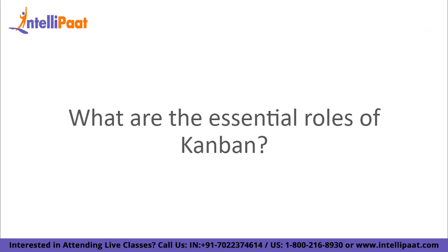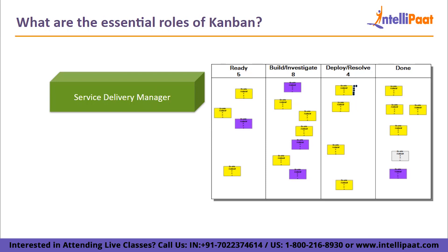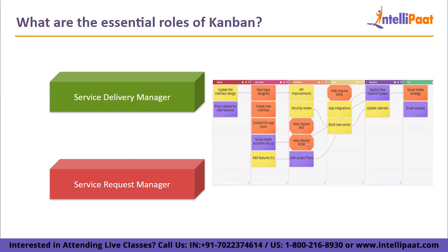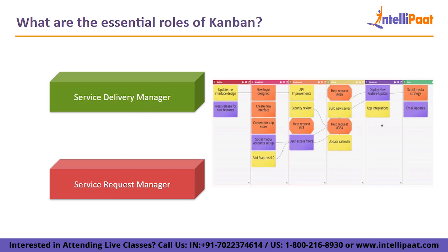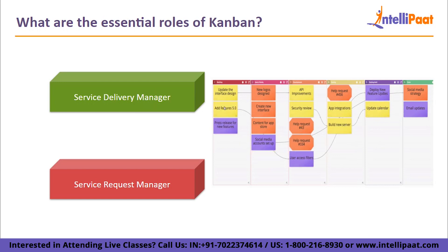Let us take a look at the essential roles of Kanban. First, the Service Delivery Manager. The SDM is in charge of increasing workflow effectiveness. Although there are some resemblances, this function is neither the same nor directly comparable to a Scrum Master. Then we have the Service Request Manager. The client's demands and expectations must be comprehended and interpreted by the Service Request Manager. It is comparable to and occasionally mistaken for the Scrum Product Owner role. The SRM serves primarily as a Risk Manager and Facilitator, using a predetermined set of value-related criteria to prioritize work items by the value they provide.